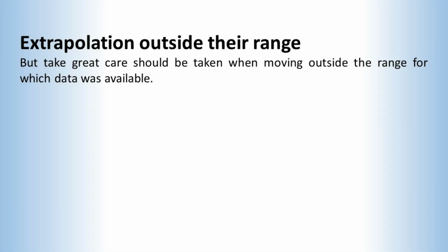We should finish up with a summary of the points to be careful of when using the CERs. The first danger is of using parametrics outside of the range of the data. These relationships will not cover an infinite range. An interpolation between data points within the range covered by the data will be safe, but great care should be taken when moving outside that range.